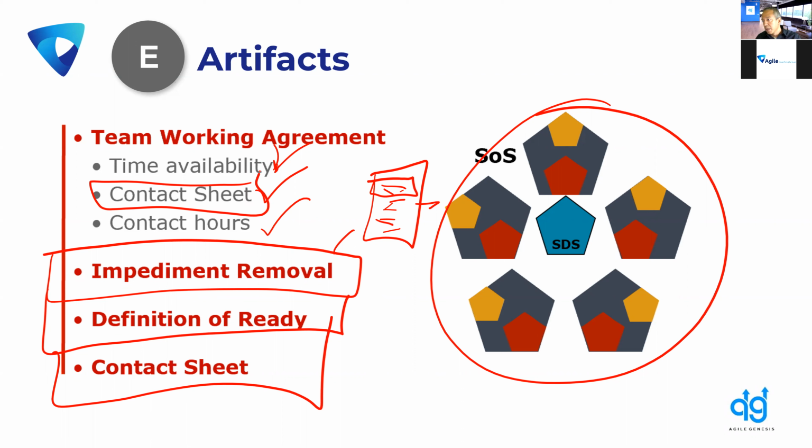So Manish had a question. Does the Scrum of Scrum, is it supposed to be daily? Yes. It is, thank you for asking the question, because I want to be very clear about that. It is very important that the Scrum of Scrum is working daily on an active basis, not weekly, not every 2 weeks. It's not enough time, especially in a remote environment.